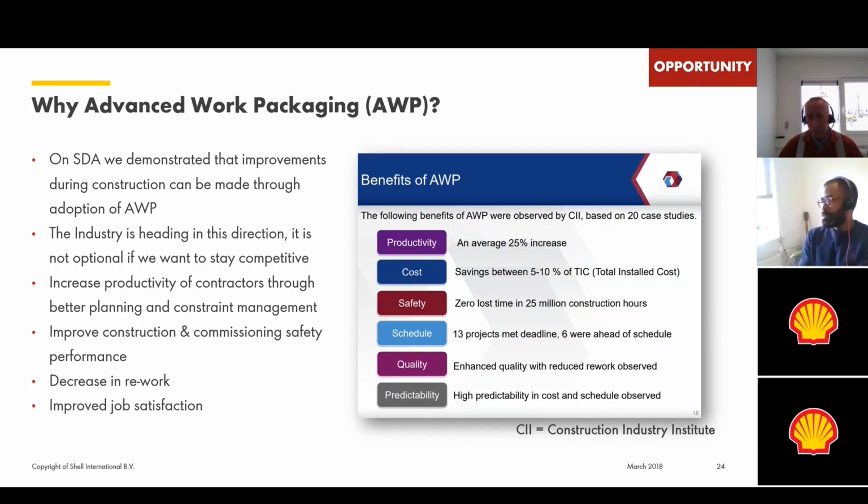And as you are going into the field much more prepared, we also believe that helps us in our quality and safety, because that's really linked to the work preparation side itself. And the other part we do see is with our next step into O3, we also engaged early with our implementation contractors. And because of the way we work together, we are making some of their systems redundant. But it also means we're taking out steps which you normally saw in the past. We as Shell handed over a package to a contractor loaded in their own system. But now what we're doing is merging those two systems and taking the double systems out of the total package. So overall, it also improves the contractor efficiency and thereby also directly our own efficiency.